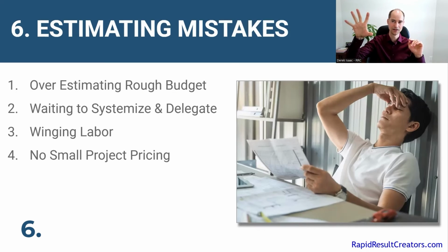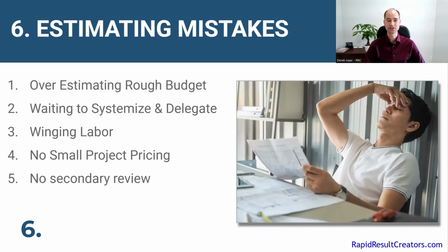You should have your base pricing that you're profitable at. And then if you have a small project threshold, anything below that, add an extra 5%, maybe even 10% to the markup.